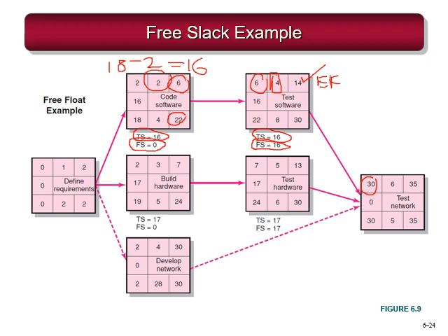So even if it finishes on the 14th day, the next activity doesn't start on the 14th day, it keeps on waiting. And again, this happens in merge activities. So this activity 6 has to keep on waiting. So this has got a free slack of 16.